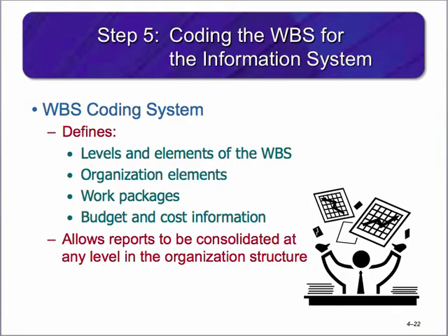Step 5 in defining a project involves coding the work breakdown structure. This provides a numbering system so that each task can be organized into deliverables. It shows the levels and elements within the work breakdown structure, the work packages within, and provides budget and cost information. Coding the work breakdown structure allows reports to be consolidated at any level in the organization structure.